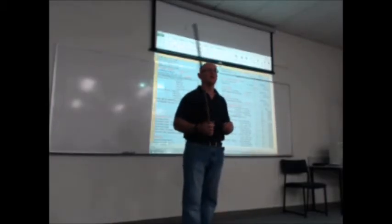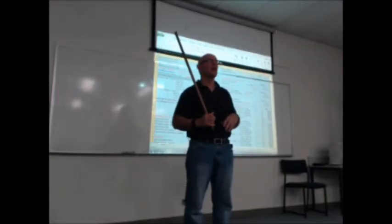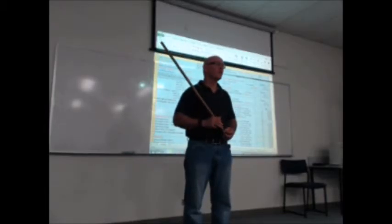The supervisor knew, he says, look at this. The front of the house was an iron rule joint finish, and then he hit it with a gurney and ripped it to shreds. What do you want to do? You back charge the brick cleaner. Well, it should have been noted on his purchase order: wash the front by hand.